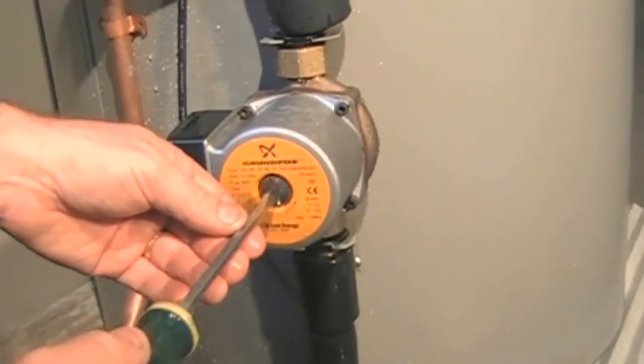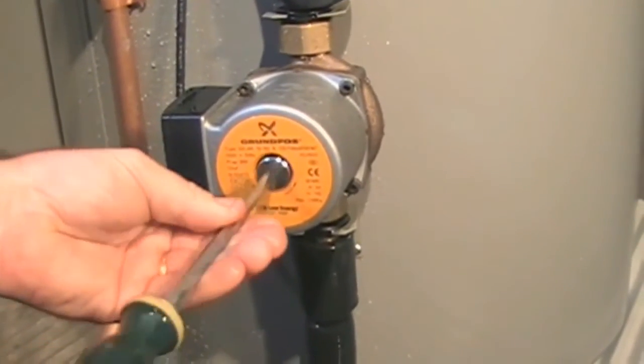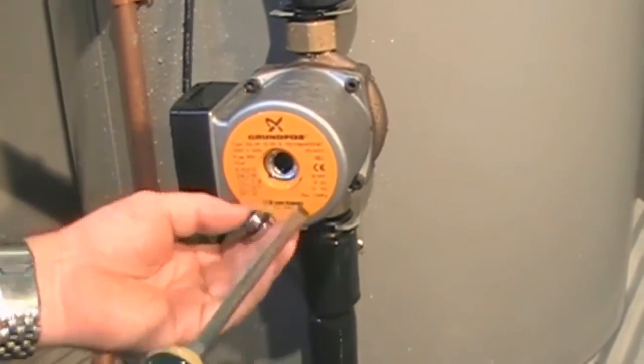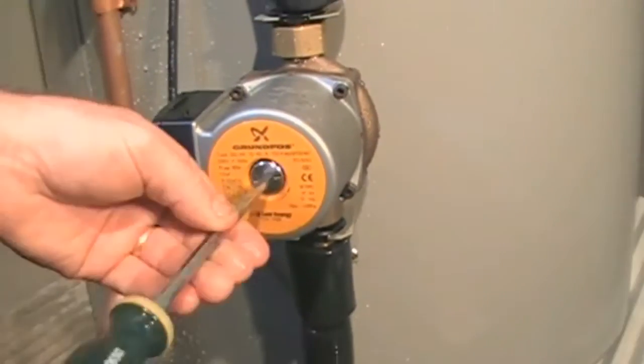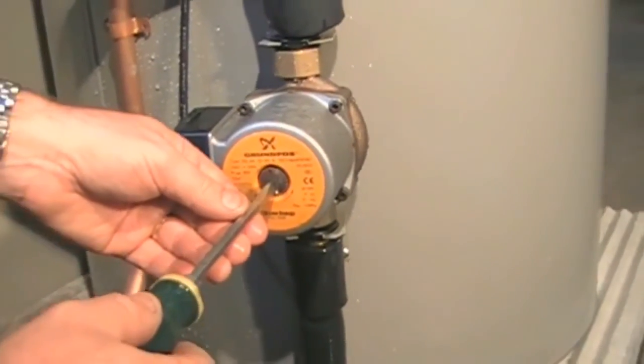Lead the pump to prime it. Before turning the power on, prime the pump and purge air from the pump by removing the screw and allowing air to escape and water to dribble from the hole. Refit the screw and check for leaks.